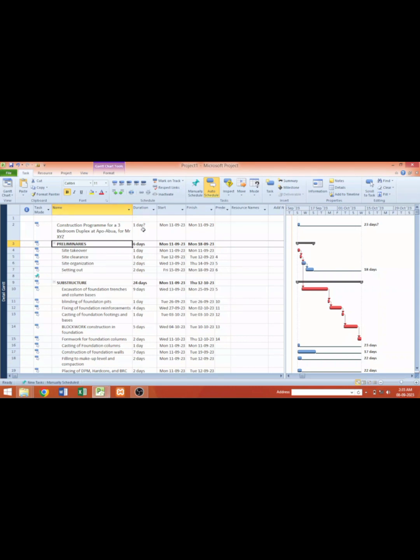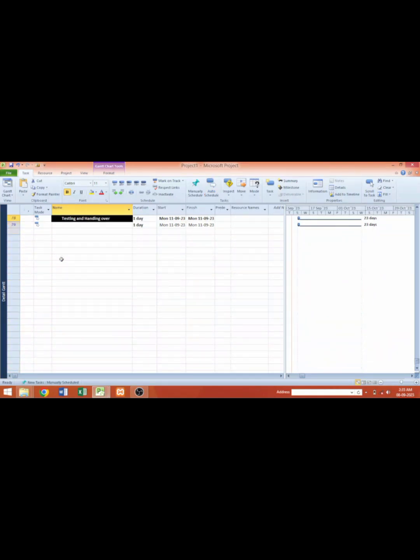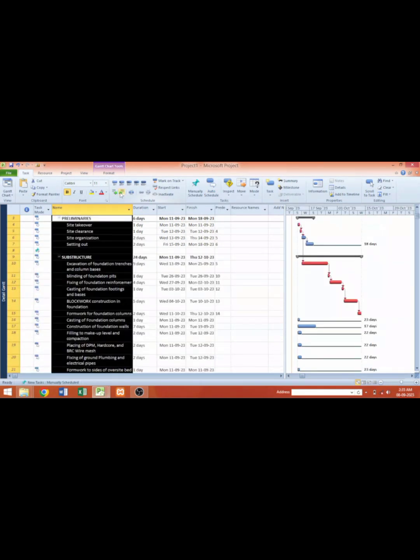And now, how do we know the entire duration of our project? Remember, we were indenting the activities under each heading to get the total duration. So to get the total duration of the entire project, we're going to indent the entire project under the heading. For instance, I'm going to highlight all the activities under the heading and then indent. What does it do?